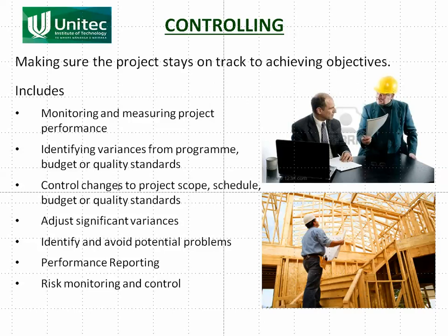What has changed, if anything, in the project? The client might come and ask for changes, or it might be that you've had to make changes. For example, if you're doing some earthworks, you may expect to be digging up clay, but when you start the excavation you find that it's rock. That's a change, and you've got to manage it. You need different types of machinery to remove the rock. It's going to take longer, it's going to cost more, and that's a variance, and you need to be managing that. You either tell the client and make sure that he pays for it, or it may be that the contractor has to pay for it.